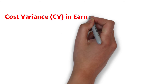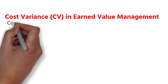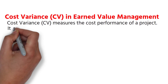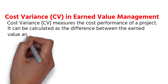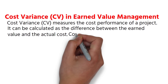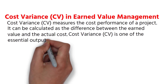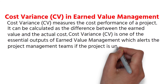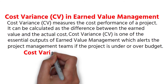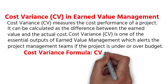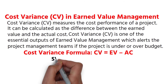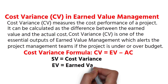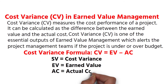Cost Variance in Earned Value Management. Cost Variance measures the cost performance of a project. It can be calculated as the difference between the earned value and the actual cost. Cost Variance is one of the essential outputs of Earned Value Management, which alerts the project management teams if the project is under or over budget. Cost Variance Formula: CV = EV − AC. CV equals Cost Variance. EV equals Earned Value. AC equals Actual Cost.